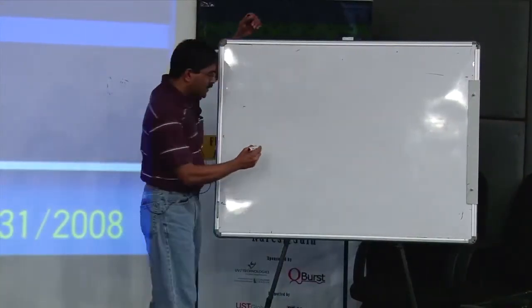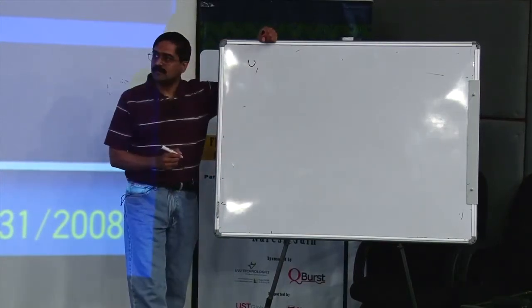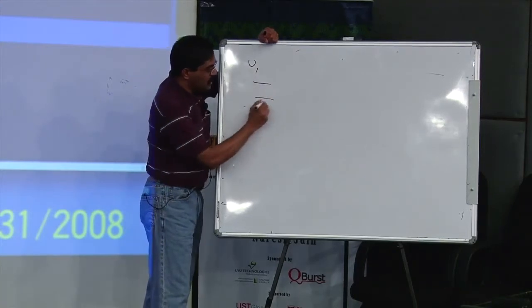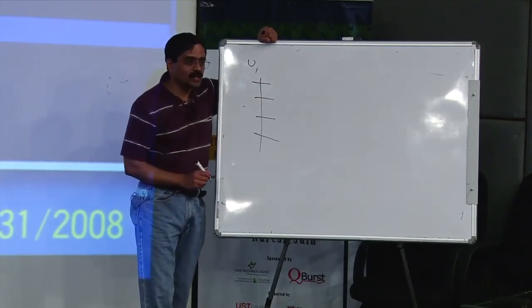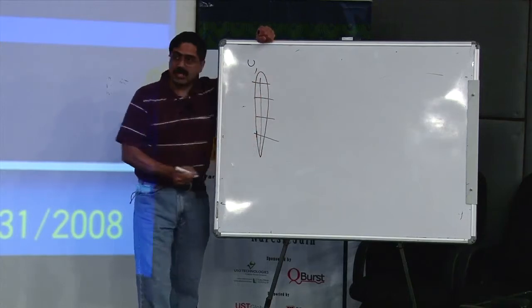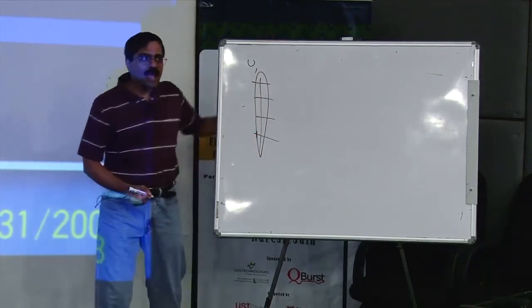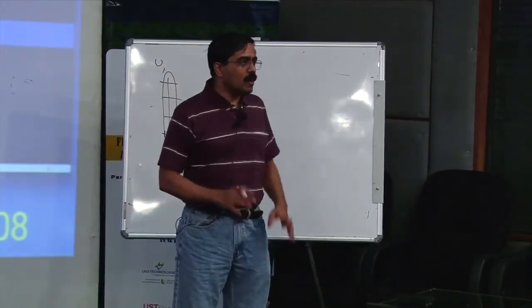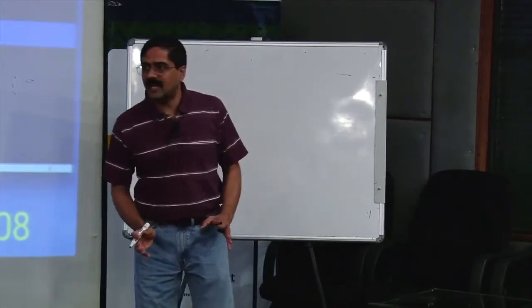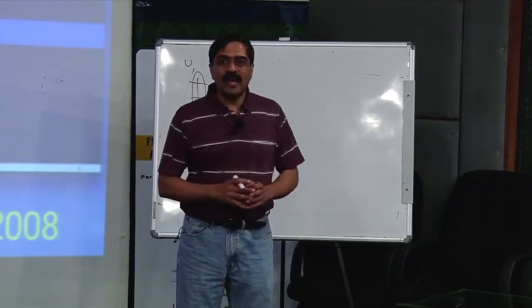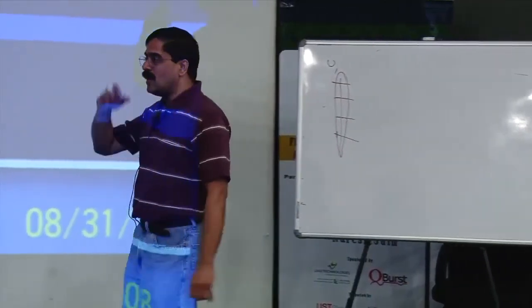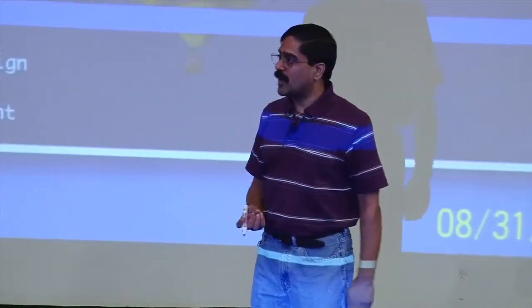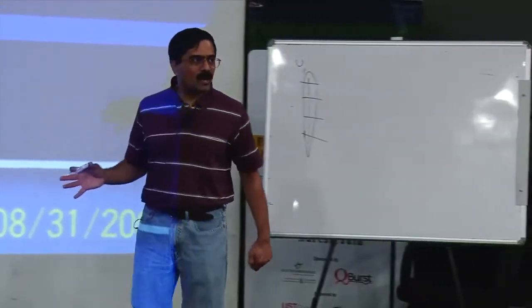Then what do we do? We say, here is our user story one. And what we're going to do is build the minimum amount of code through the slices of the architecture, but only enough to support this user story. I would have everything working, but only enough. I'm not going to perfect it. Don't confuse not perfecting it with poor quality. You're not doing everything, but what little you're doing, you do to a very good quality. Good tests written, good exercising of automated tests, good quality of code, other people review the code, you follow good design principles. All that goes in, not some shabby code written quickly.